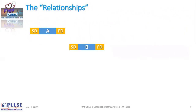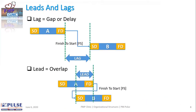Let's take one of the most common relationships that everybody is aware of: Activity A finishes and only then Activity B starts. Activity A should have finished before Activity B starts, and therefore we call it FS, or Finish to Start. I keep repeating this so you write it down and don't get confused with Float.